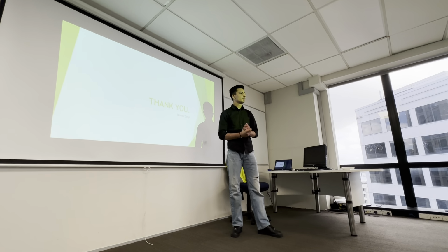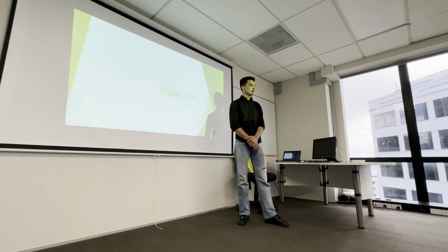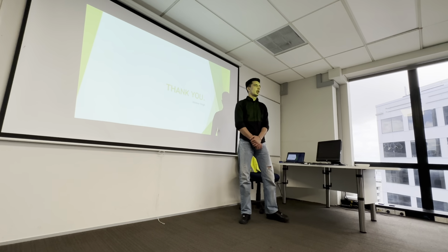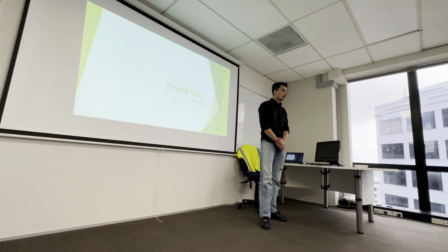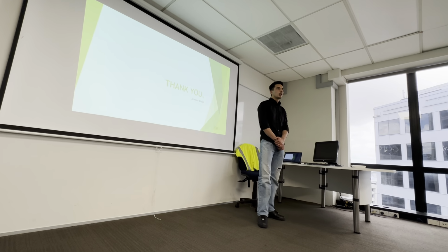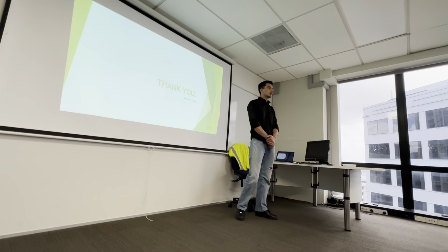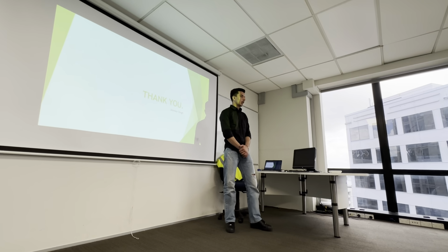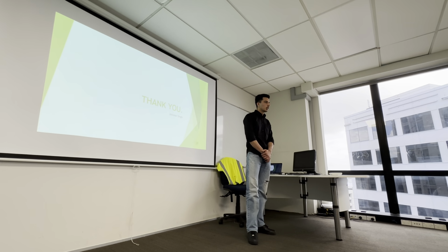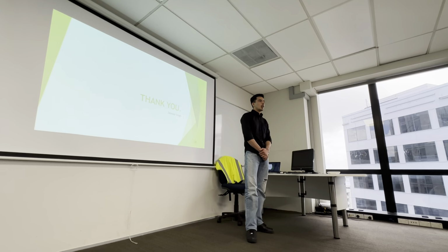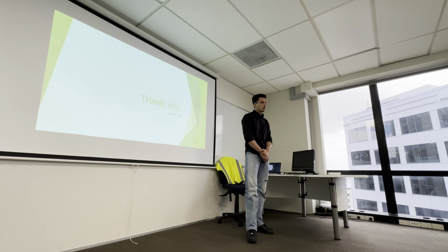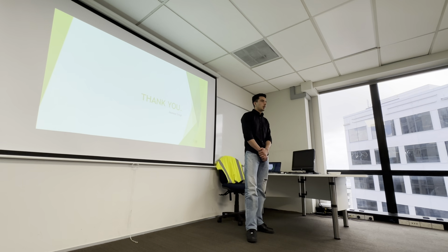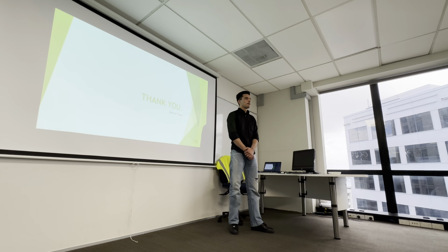What are the standard methods of measurement? In New Zealand, we use the Australian New Zealand Standard Method of Measurement 2022, and different standards are used in different countries. There are many types of standards like SMM 7th edition Standard Method of Measurement, ANZ SMM 2022, ANZ SMM 2018, POMI, etc.